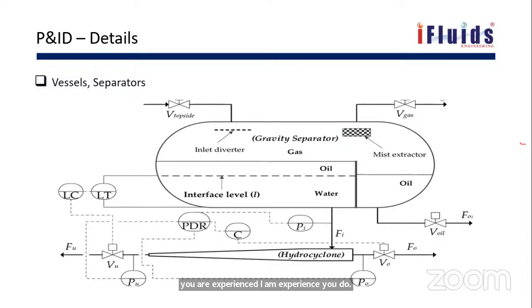I will not ask to go for piping. Since I am experienced and have worked on many projects, I will take the layout, take the data on my own, and then I will work. But officially, we need to get it through the respective system engineers, through the channel. Actually, after this 30%, we have HAZOP. During that HAZOP review, they may find the need to reroute the piping. That time we need to do that.